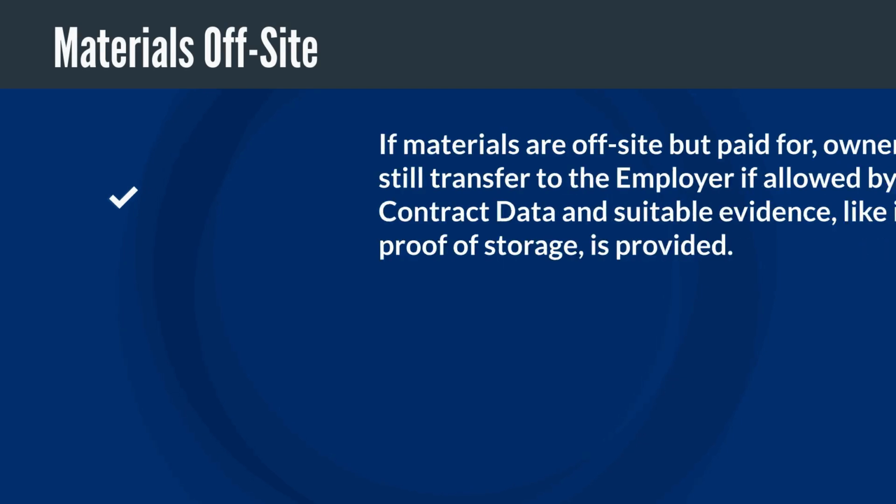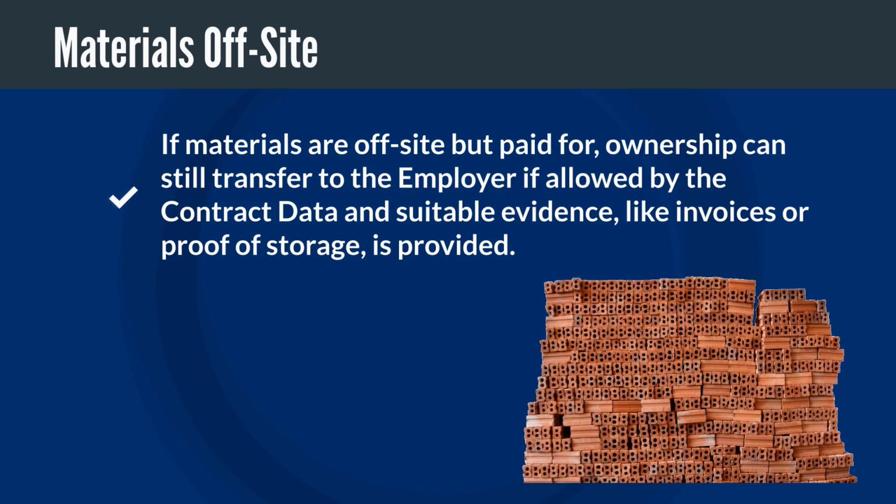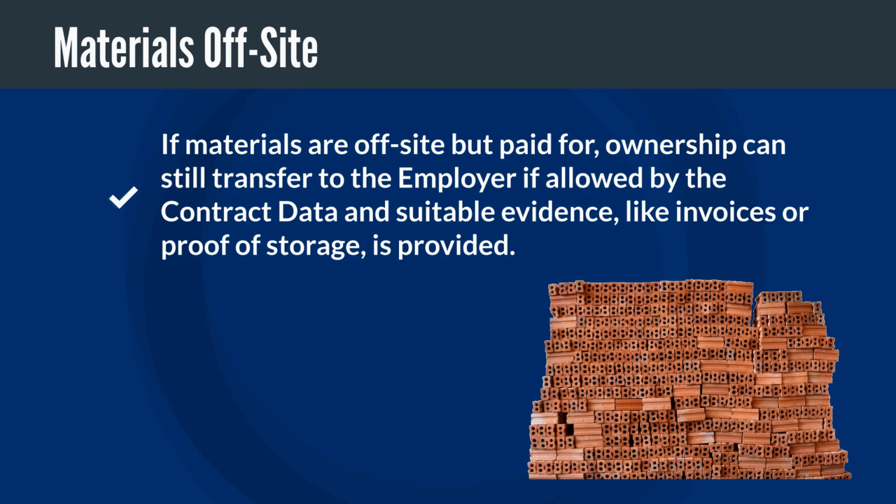Materials off-site. If materials are off-site but paid for, ownership can still transfer to the employer if allowed by the contract data, and suitable evidence, like invoices or proof of storage, is provided.